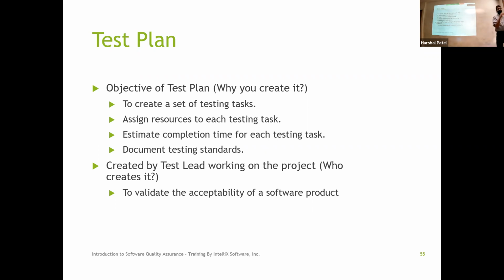So the builder has to go in and figure it out. Okay, in order to build a house, what do I need, right? So he's going to say, hey, I need this much amount of work to construct the house. But then I also need to specify this much amount of time to do all those regulatory compliance checks and all the inspections. Right? I need to know what inspections I'm going to do so that I can plan for it and how long each one of them is going to take, so that I can plan it into my schedule.